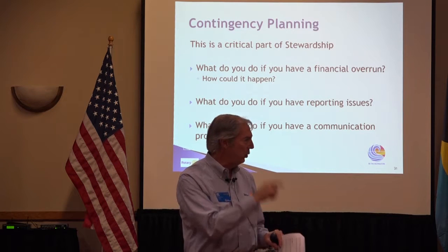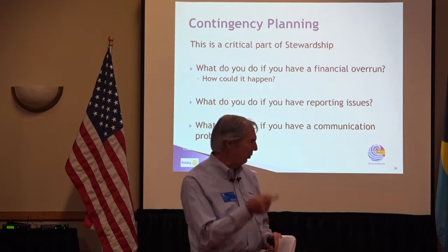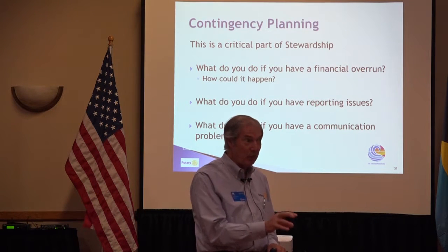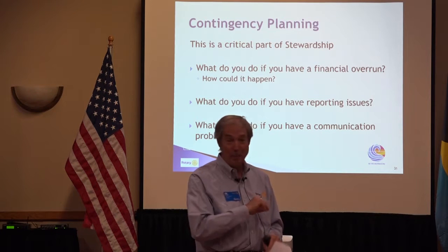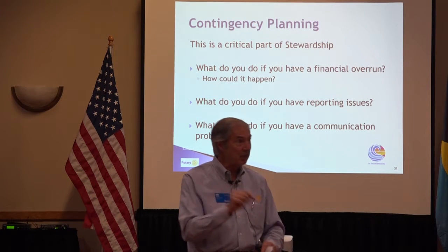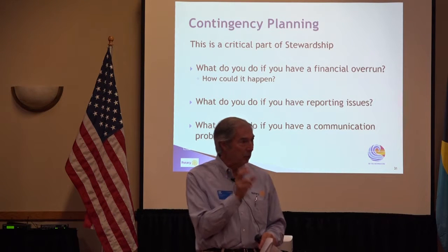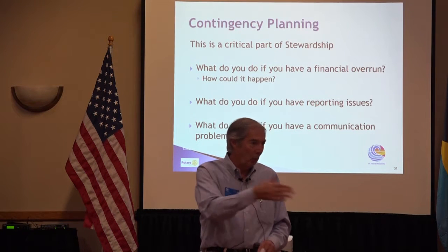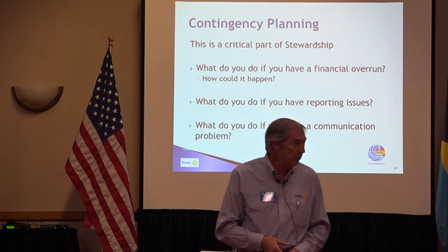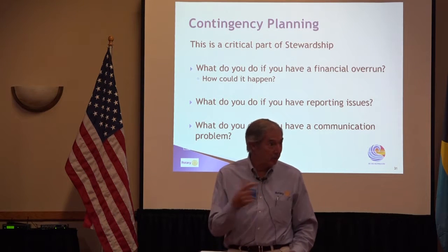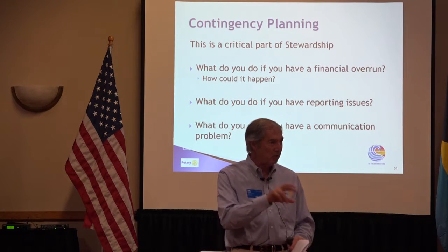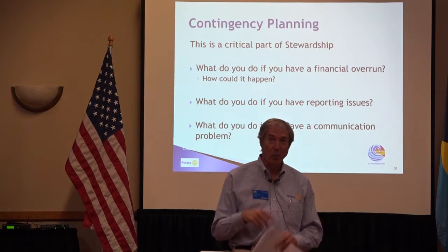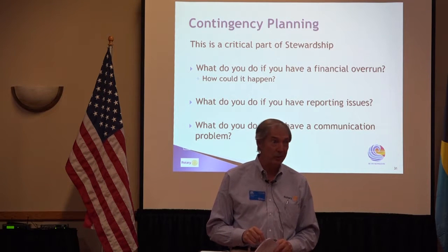So you do 25 and you have a financial closing. Did we do them at the right rate so that we know we're on track for the whole project? If the first 25 overran by 50%, you better be writing a progress report that says we're 50% over on our first 25. We're anticipating that instead of 100 wells, we're only going to have 75 or whatever the math comes out to. Right? And so that's okay, but it's a good way of dealing with that if you got something with multiples in it. If you have something where you're only doing one thing, then you better have other ideas for where you're going to get the money and how you're going to do it.